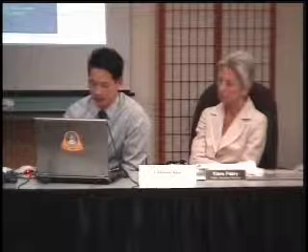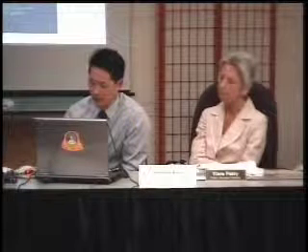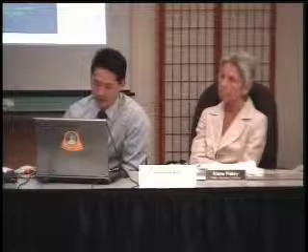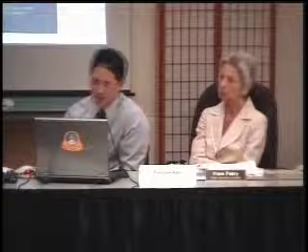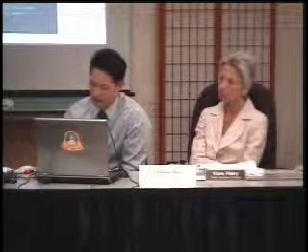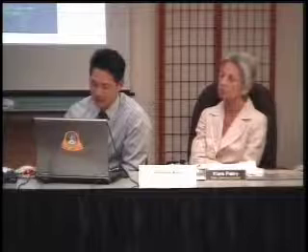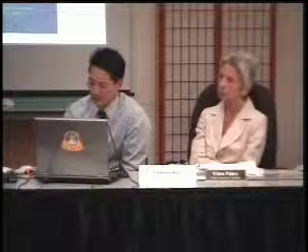The proposed contract amount of $120,000 would provide for the repair of approximately 3,000 sidewalk offsets, with the 25% contingency to account for the variability in quantity estimates and individual repair costs. Precision Concrete Cutting has satisfactorily completed numerous similar sidewalk repair projects for other public agencies in the Bay Area, including Daly City, South San Francisco, Emeryville, Mountain View, and San Bruno. This concludes my presentation, and I'm here to answer any questions.